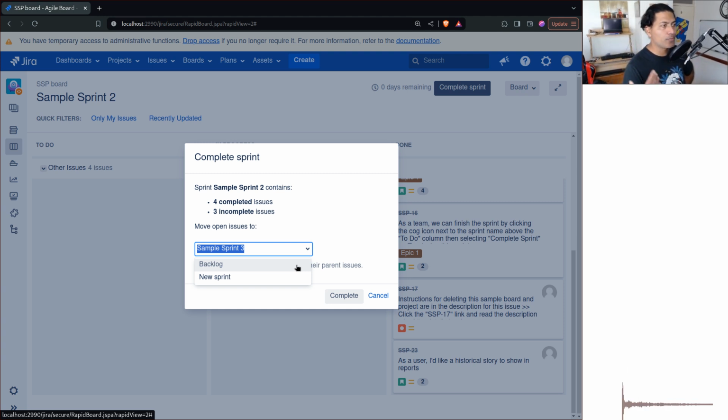So the reason is that you have to make sure that whatever states you have in the workflow, if those states are maybe the final closure, then make sure those states are mapped to the final, last, rightmost column of your board configuration.